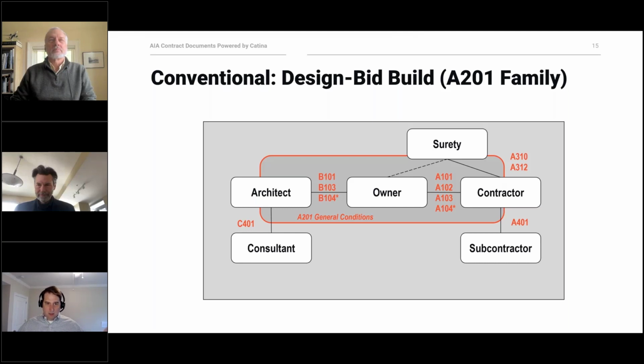But you know, it goes through that linear process where the full design happens, then the contractor comes on board, then the contractor, although they've set their price, now has an opportunity to look at the design, and there's limited opportunity for collaboration with the design team. So unfortunately, the party that designs it and the party that builds it have limited communications throughout the design process.